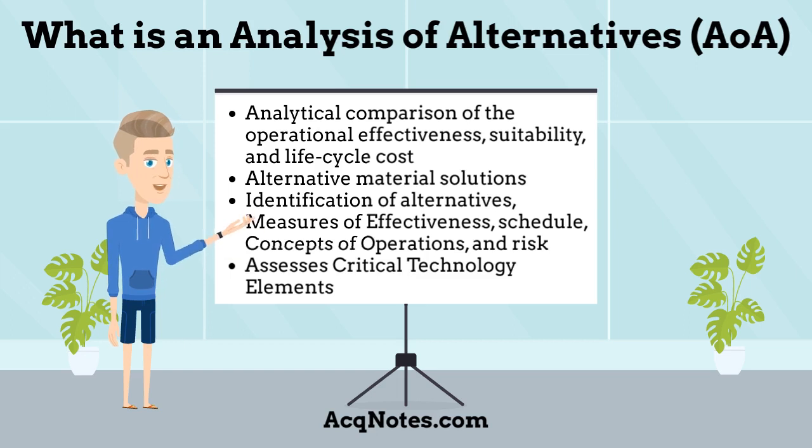It focuses on the identification and analysis of alternatives, measures of effectiveness, schedule, concepts of operations, and overall risk. An AoA also assesses critical technology elements associated with each proposed material solution, including technology maturity, integration risk, manufacturing feasibility, and technology maturation and demonstration needs.